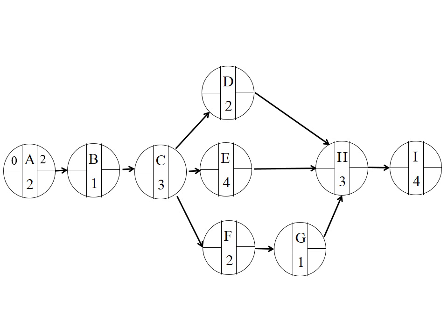B follows A. So when is the earliest you can begin activity B? At the end of month 2. And it takes 1 month. So you can finish it at 3. And begin C at the end of month 3 and complete that at the end of month 6. D, E, and F, they all follow C and they can all be started at 6 and completed respectively in the same fashion. You know what to do.